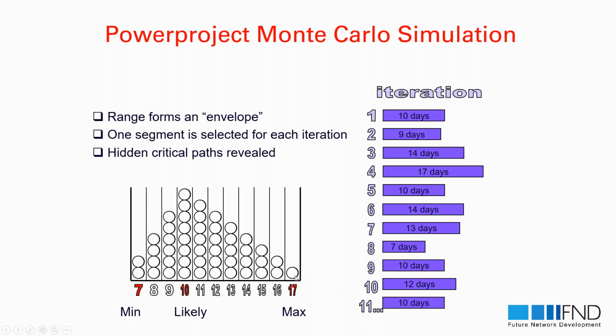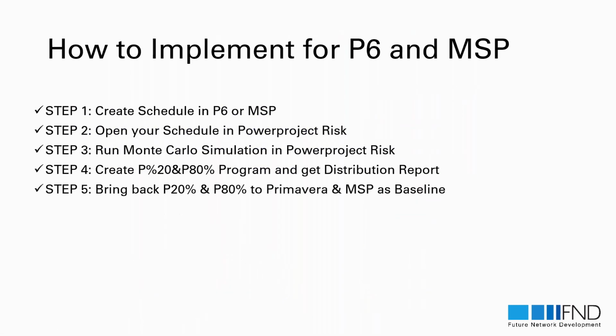So you can see that with 50 iterations, if I select 50 balls randomly from the envelope, one time it is 17. So my calculation of the critical paths, duration estimation and uncertainty will use 17 one time, but 2 times in 50 it is 16, and 3 times in 50 it is 15. So it is most likely just showing the time.